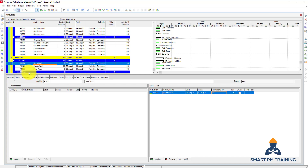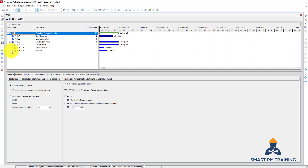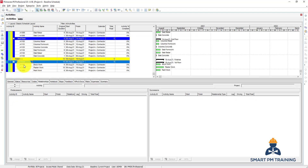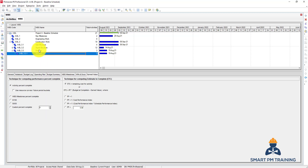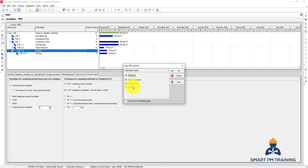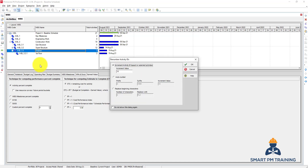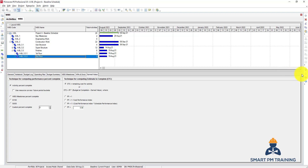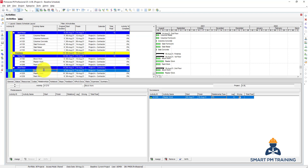There is another type of copying in Primavera - not only copying activities but copying the WBS with all the activities underneath. Let's delete the second floor WBS which doesn't have any activity, click Delete. Now to create the second floor WBS, you don't have to create the WBS separately before copying activities - you can do it right away. Copy the whole WBS, click Copy, go to Finishes so the second floor is at the same level as the first floor, click Paste, confirm yes to copy activities, click OK, and rename it to second floor. Organize it below the first floor, go to Activities, and now you have all activities copied under this WBS.